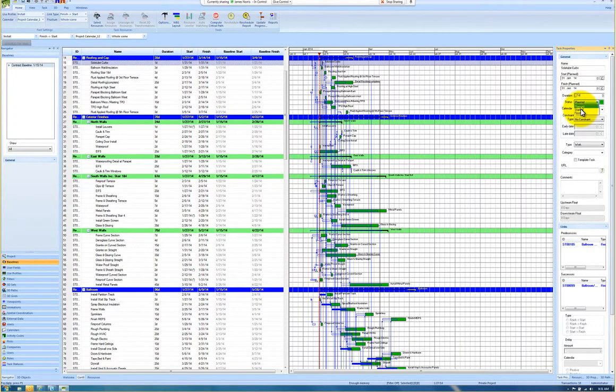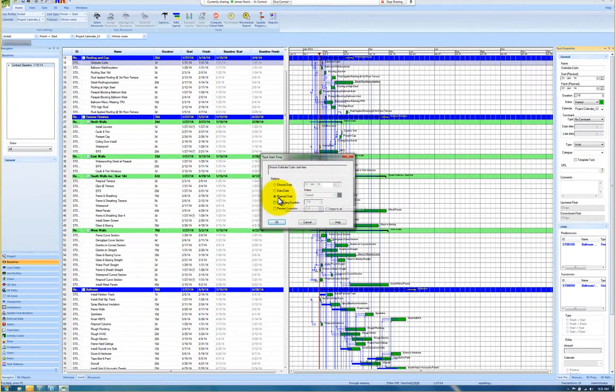So let's go ahead and do that. I'm going to go to Start. Okay. Now, don't choose Plan Start. You have to choose the date. The Plan Start would actually have you starting on 131. So we need to choose the date. And looking at the baseline, we're like, all right, well, we started this task on time. Okay? So at this point, I'm going to choose a date, which is 121.